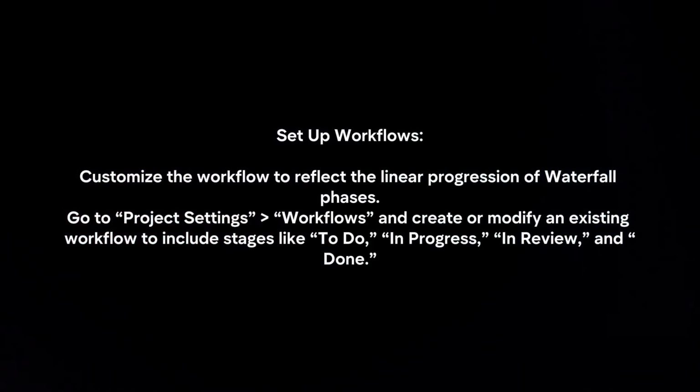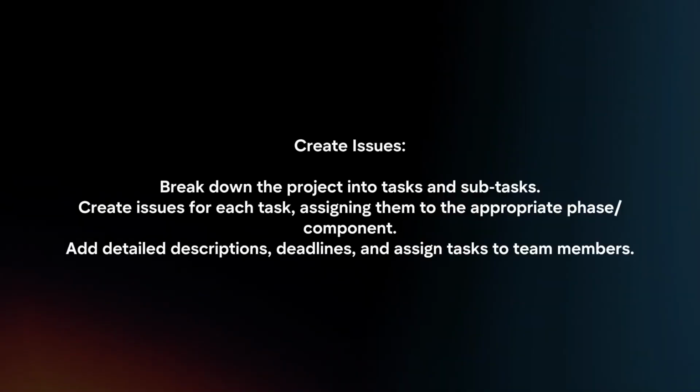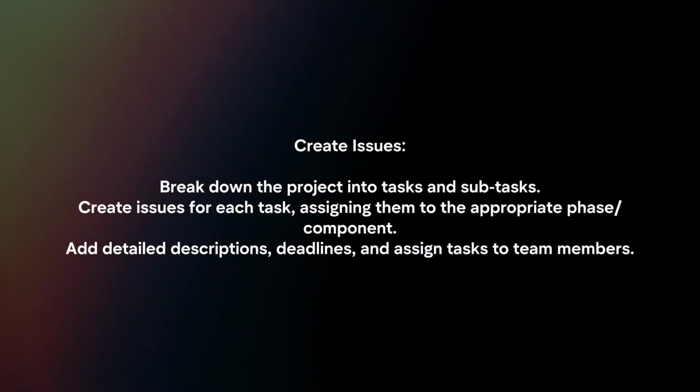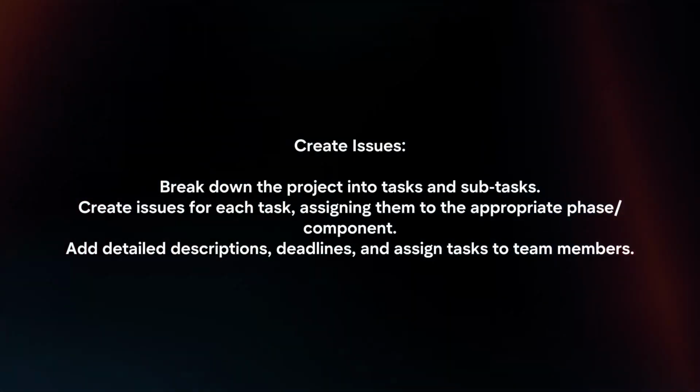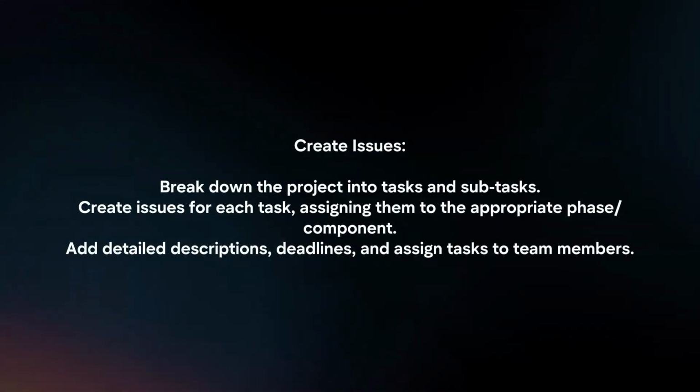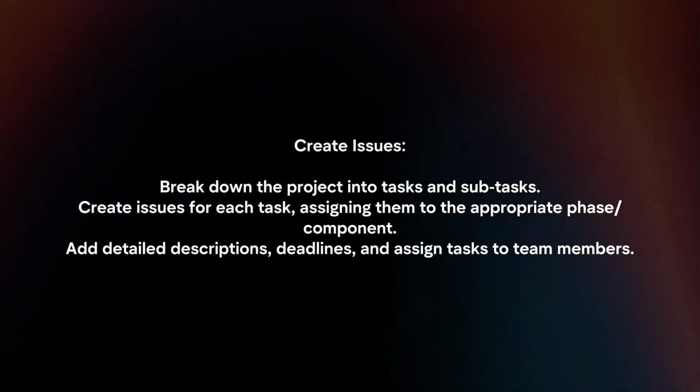Create issues. Break down the project into tasks and subtasks. Create issues for each task, assigning them to the appropriate phase or component. Add detailed descriptions, deadlines, and assign tasks to team members.